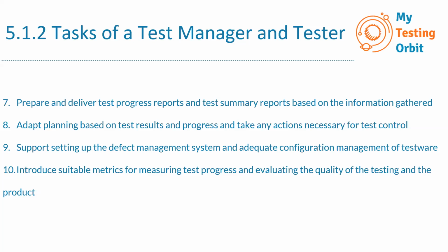And that's the responsibility of a test manager. It can be as often as a daily report as well, that maybe at the end of each day, a test manager needs to send out an email with the report attached: what's the status, how many bugs are there, what are the severities, etc. How likely is it that we can meet the deadline, etc. And at the end, when the project completes, a test summary report is also generated.